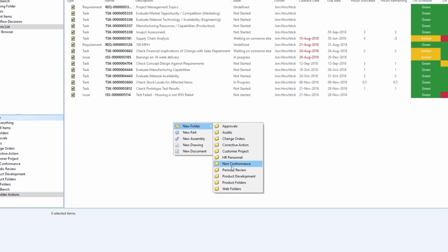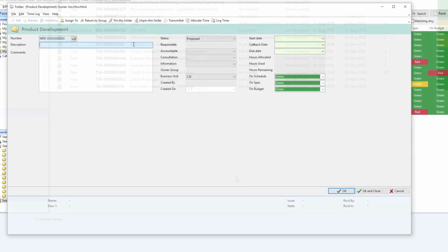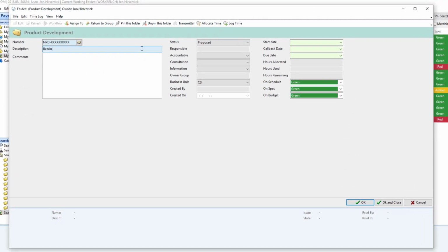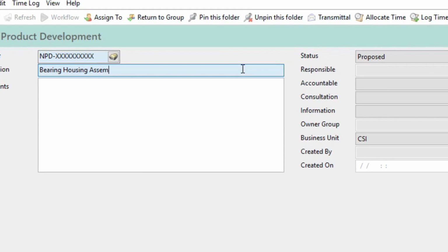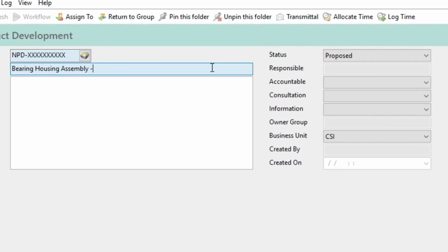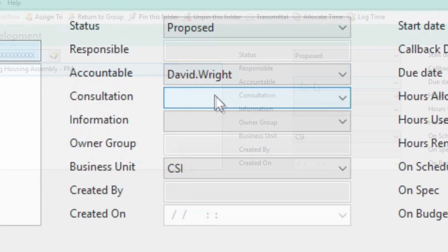So the new attributes that we've introduced into DDM. Let's start with the RACI attributes. Again, this is all related to project management. And the RACI attributes give us the ability to assign who is responsible for the program, the project, or the action. Who is accountable for it, and when we look at accountability, one individual must always be accountable.